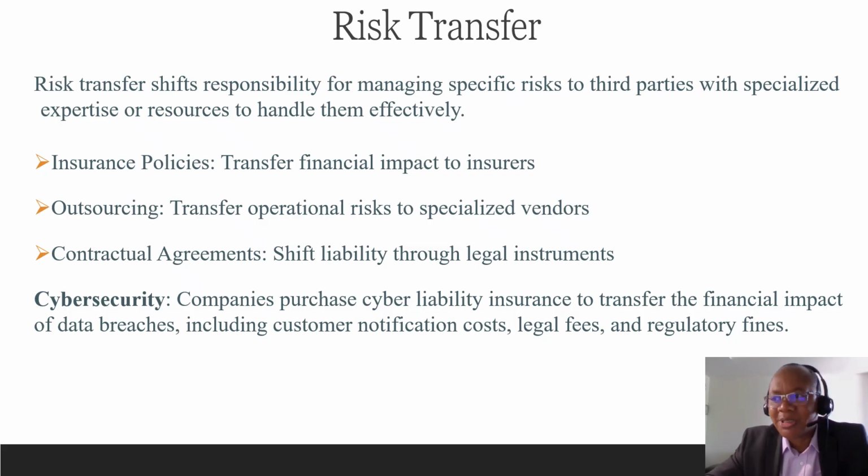A typical example is cybersecurity. Companies purchase cyber liability insurance to transfer the financial impact of data breaches, including customer notification costs, legal fees, and regulatory fines.